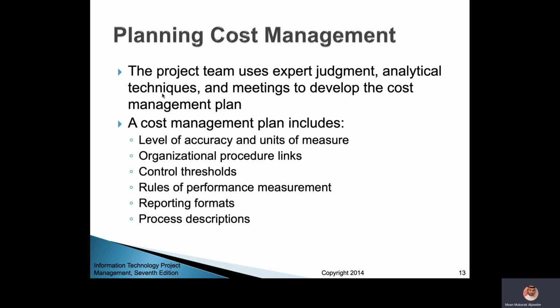So you need to say that if you are going to spend anything on equipment or on devices, then we need to follow the organizational purchasing procedure. Okay, and you can refer to these. And there are others like the rules and threshold controls, and you assign some thresholds on some of the budgets.